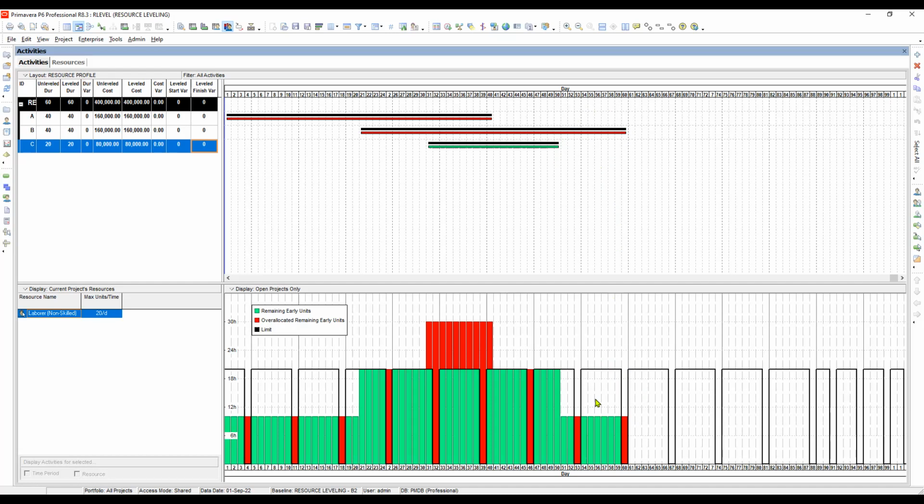So that means if you insist on this date, if you will not extend your project, you are required to supply or to source for the supply of these resources during this period. Okay. So next, there is no movement. Okay. So next we will go to the second condition.